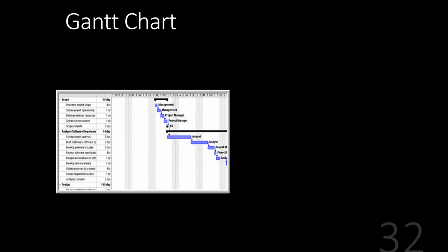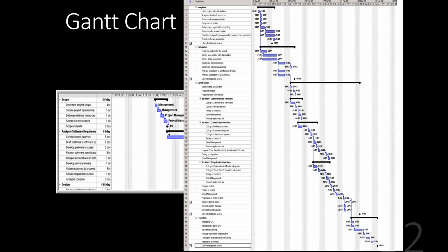So some tasks can't be performed until a previous task is fully complete. Sometimes they can be started once the previous task is 50% complete, or it may be independent of any previous task. So here we've got them laid out in sequence, and you'll see these things get pretty big. We often would keep our project plans for the larger projects in a printed version once we had run them through the software and kicked out the reports. That would often take up 3-inch 3-ring binders. So the thickest 3-ring binders you can imagine, all full with project plans and detailed steps and which person was assigned to each task for projects that we would have 100 people on.